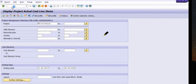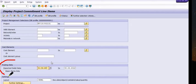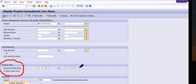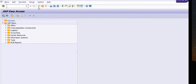Next, check for any open line items in CJI5. Click on the open line item option. If any open line item is there, you need to address it. If no open line items exist, the system will give you the message 'No open line items' and you can proceed to the next check.